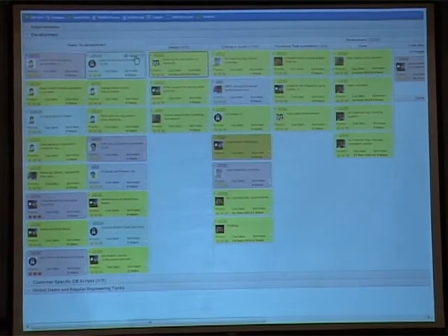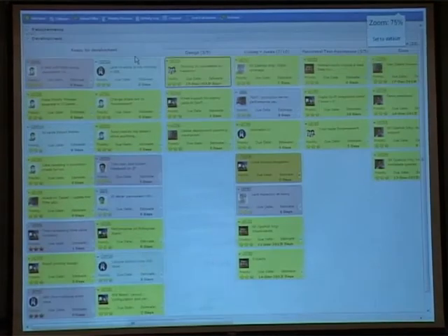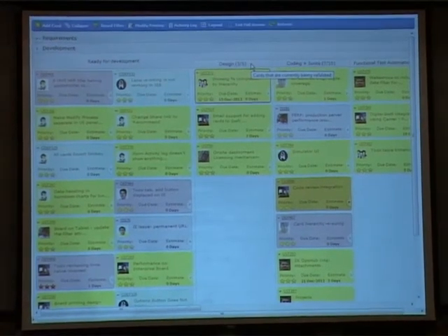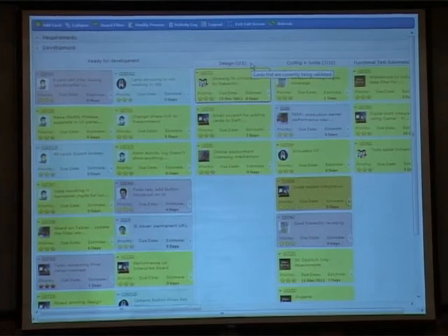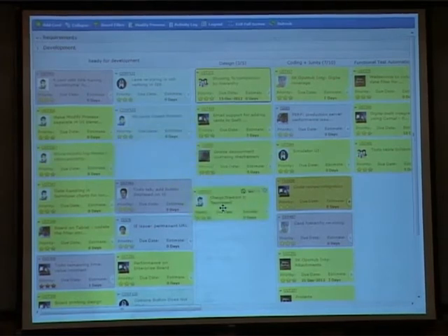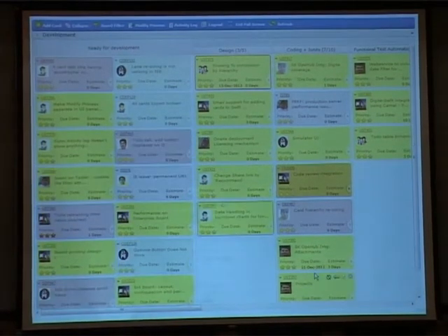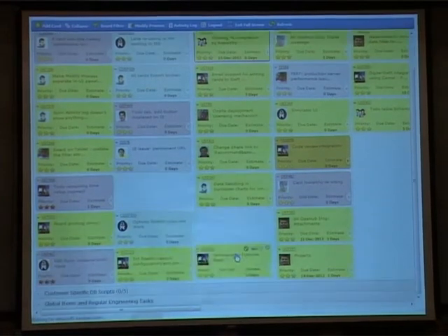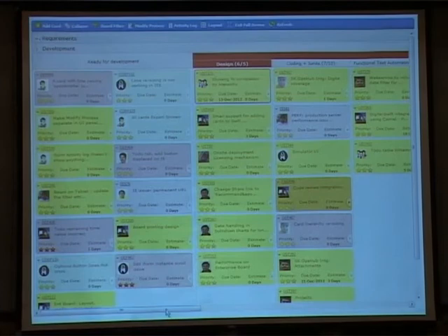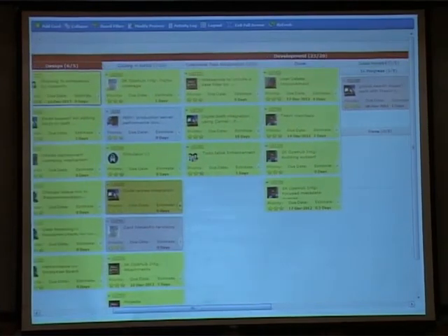As you can see, every lane has this number called 3 by 5, which essentially means that the lane has a WIP limit of 5. And at this point of time, there are 3 cards on it. And if I were to hypothetically drag and drop a couple of cards here, then very clearly the WIP limit that I have for my entire development lane goes for a toss.